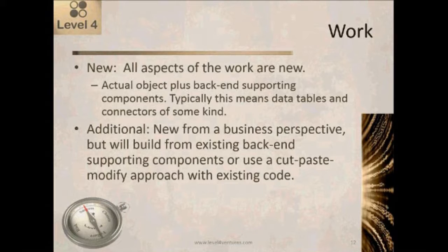Additional means that it's new from a business perspective. So as far as the user is concerned, it's a new report or new page or new interface, new whatever. But from a developer perspective, we're going to be building from existing backend supporting components, or we're going to be using a cut and paste and modify approach with existing code.